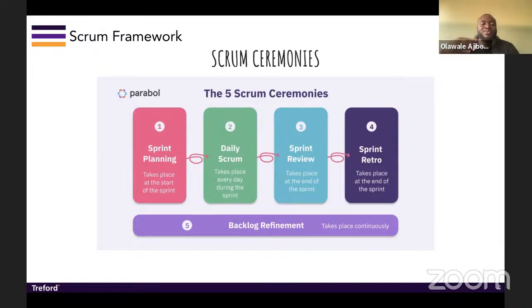And so for you to make that backlog refined, you have to have a refinement session. And in that session, everyone comes and talks about what is important, what they understand, what the user story is, and checks if they understand it, validates it, and pushes it to the top of the backlog in the order of importance.